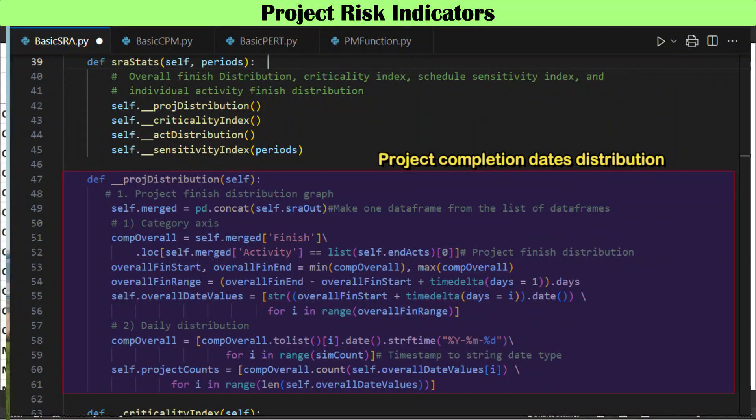A likelihood distribution and cumulative distribution of project completion dates is an important indicator, like a probabilistic schedule. The number of iterations is counted and stored for each completion date, and a running total is calculated over the whole project completion dates range.